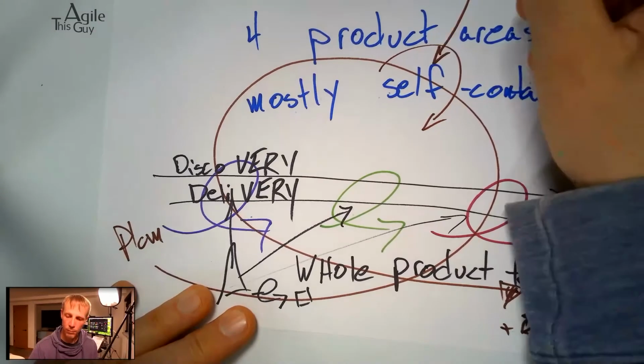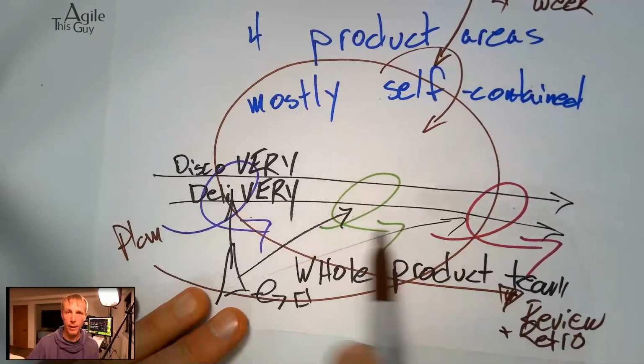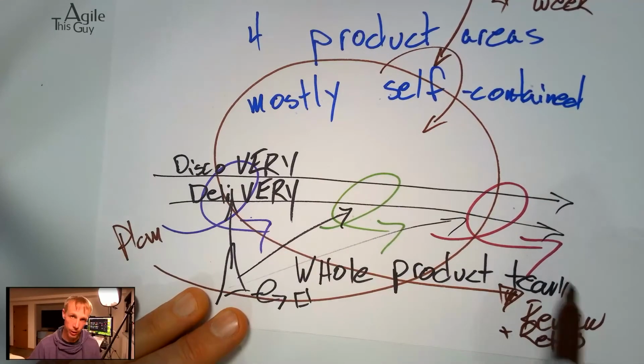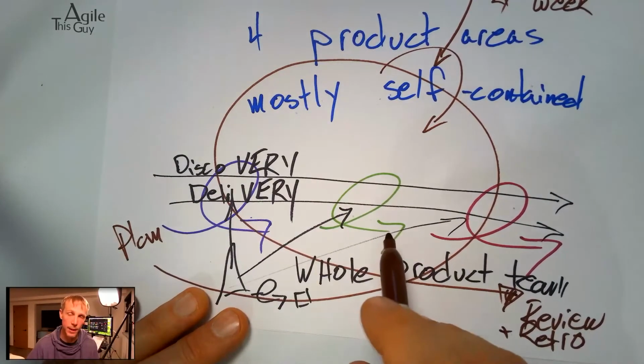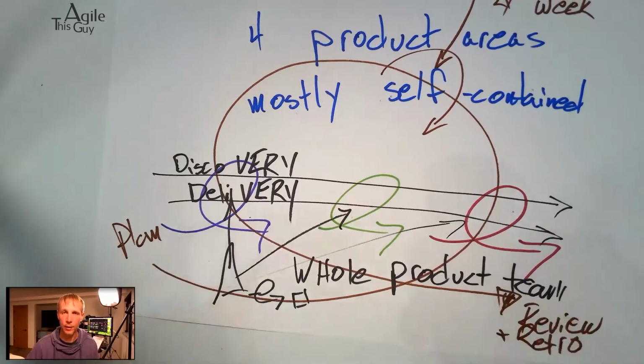And that meta stand-up would happen about twice a week to make sure that any dependencies were cleared and preempted, impediments, and that we could continue to progress together as an organization and series of teams.